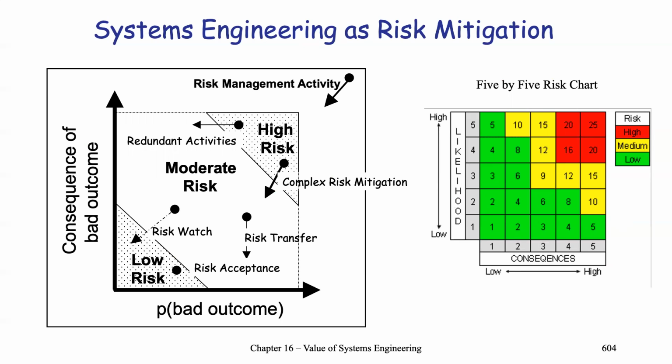And so what we have here is a 5x5 matrix, which is typically how you start to point out where a risk would be, and then you would have it labeled here. We just have each of these squares labeled, but say you have a risk that lands way up here, where it's a high consequence and a high likelihood.